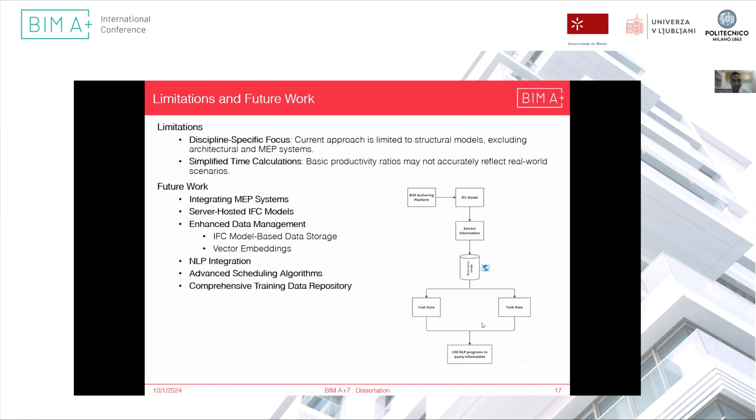For the future work, we can integrate the MEP systems and the architectural systems also inside this methodology. An IFC model can be hosted on a server, and the actual dates of completion can be updated using the daily progress reports. Also, the extraction of the information from an IFC file can be done by converting the IFC data into vector embeddings and using advanced NLP techniques to extract the data automatically.